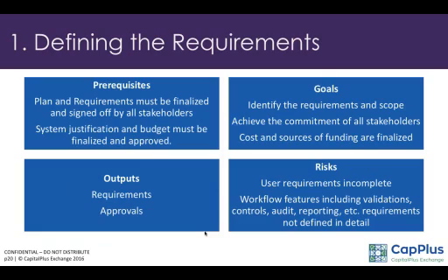Typically, a functional specification ends up being a laundry list of all imaginable functionality, which should not be the case. We need to try and identify the right ones. Any financial institution will try to cover all bases when they do a system conversion project. But as you know, conversions can be lengthy and costly processes. And what you need to do is plan for the medium term. You need to look at requirements for, I would say, 3 to 5 years.